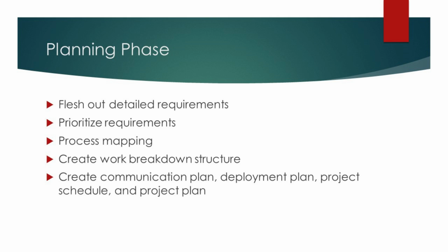After that, a business analyst will take the requirements and facilitate a discussion with the technical resources to create a work breakdown structure, which breaks the requirements into large pieces of work, and then breaks those work pieces down further into tasks and subtasks that have an estimated duration associated with them. The project manager will then work to get resources assigned to those tasks.